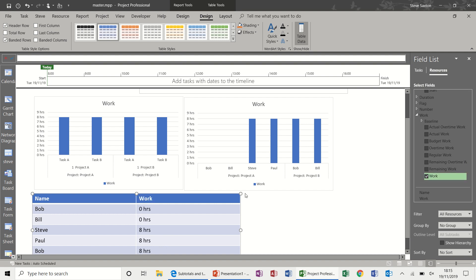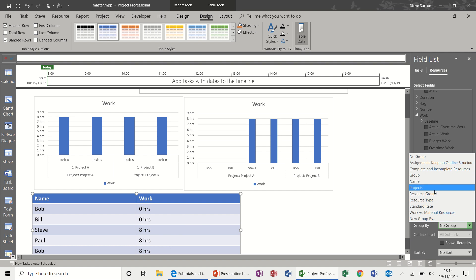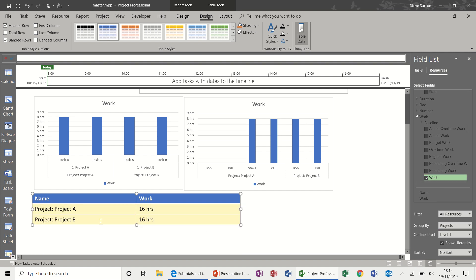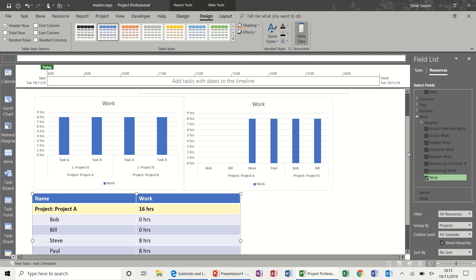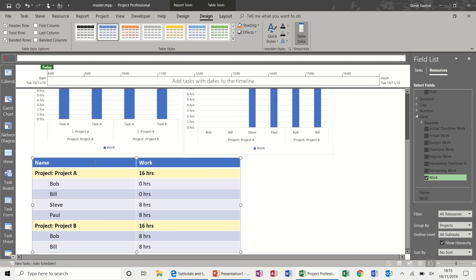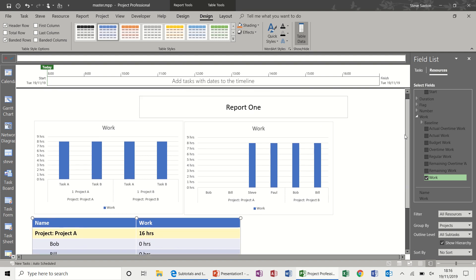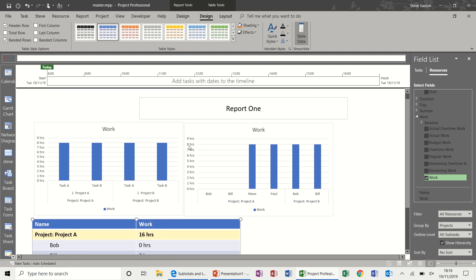It gives me the hours worked, and again Group By Project — Project A and Project B — then show all subtasks. That breaks it down by project and shows how many hours are worked or planned for those resources. That's a quick overview of how to create a report across multiple projects.